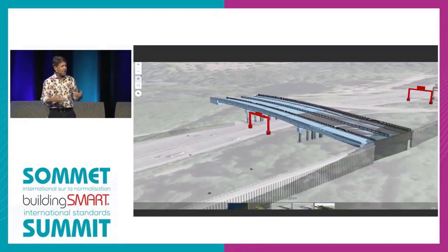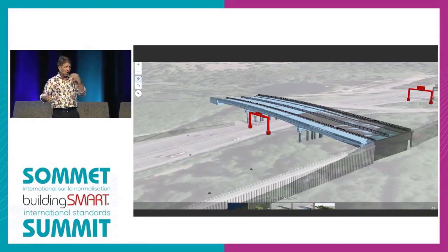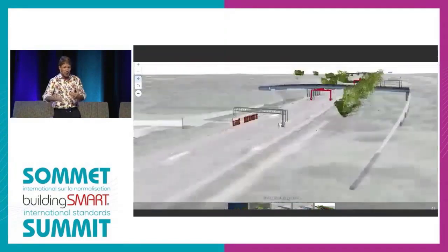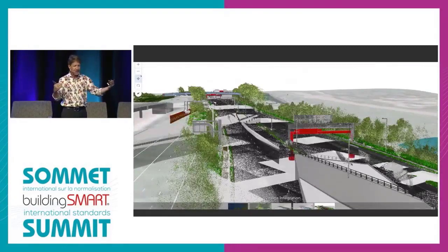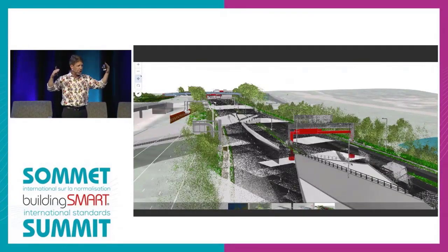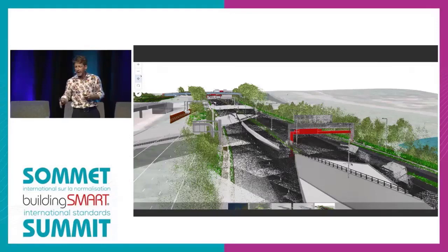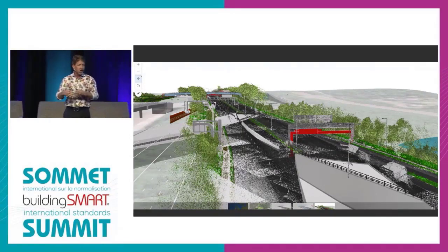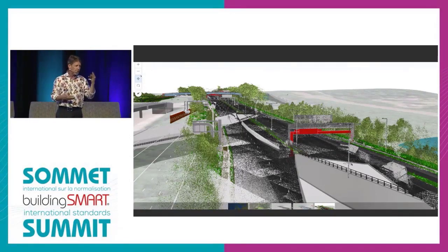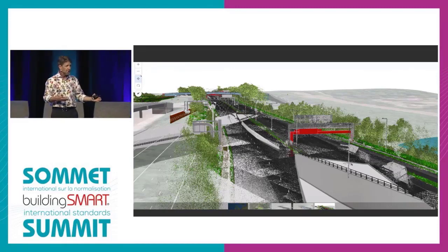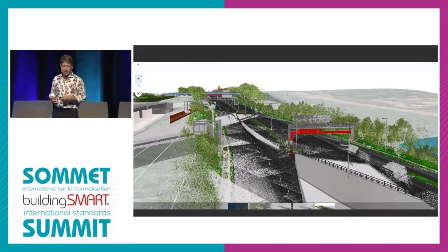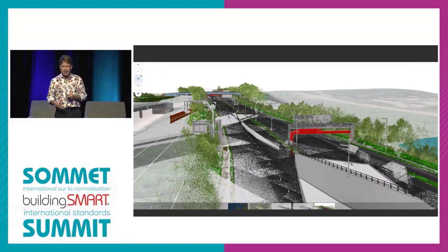They received a second phase of tender documents in the middle of the tender phase. They still had the same deadline to deliver their bid, but using ArcGIS, using IFC data, they understood these changes in the design, which allowed them to be better informed that the overpass size was changing, the gantry signs were changing, and various other elements of the design in real time. They were able to understand this, update their bid, update their estimate, update their schedule. They ended up winning the project, and they're actually in the final stages of construction planning.